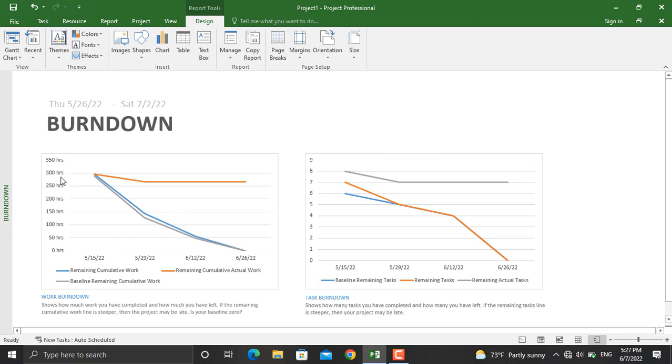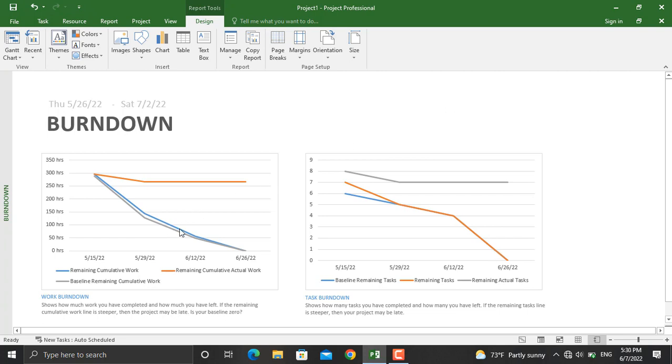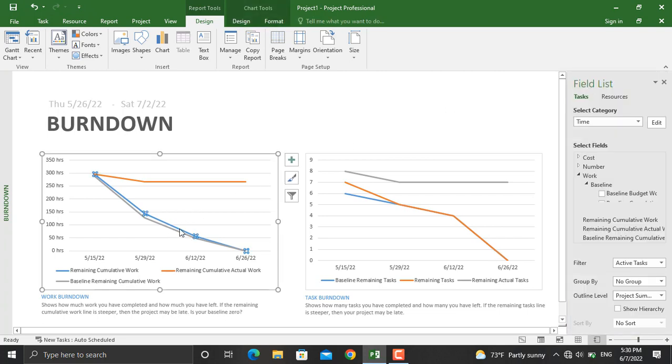In total, we have 300 hours of work planned to decline per the baseline. For task burn down, the total planned tasks are shown and will decline in this pattern. If you click on any line, the chart data will be shown on the right.